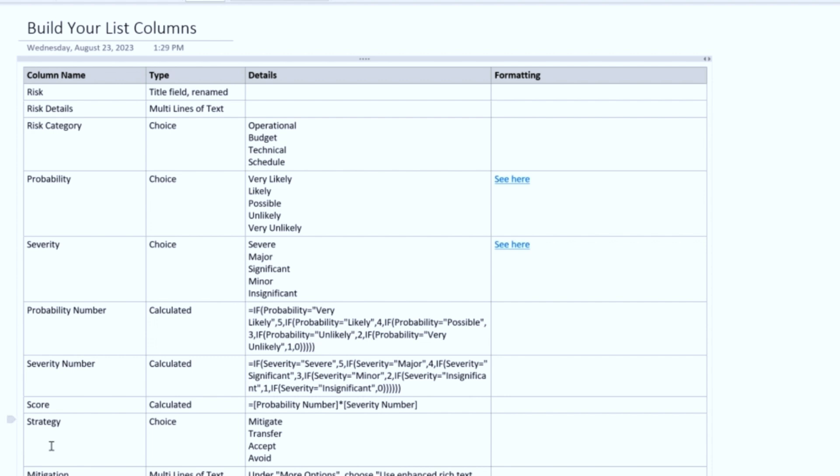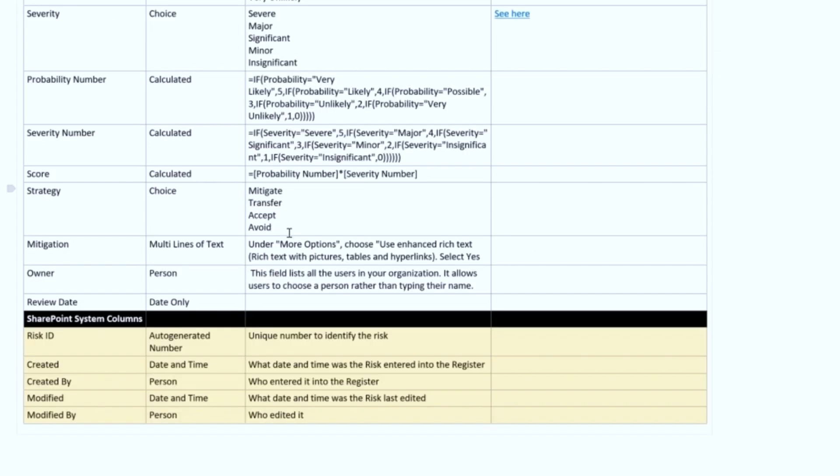Strategy is going to be a choice column, and the choices are going to be Mitigate, Transfer, Accept, or Avoid. Basically, how are we going to approach this risk? And then Mitigation is going to be a multiple line of text field. And I'll explain this further when we get to it. But the mitigation is basically the details on how you're going to mitigate your risk.